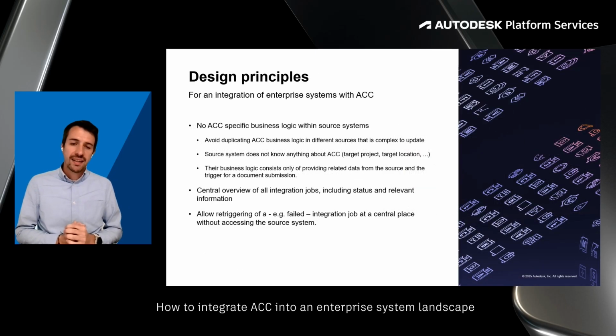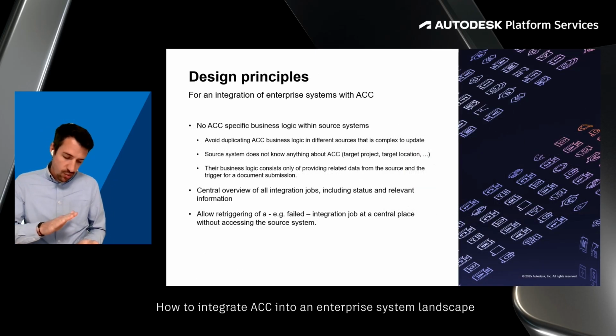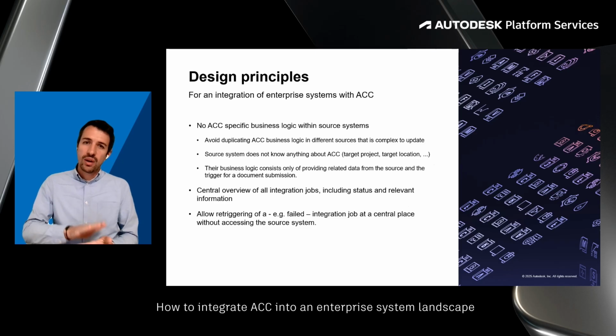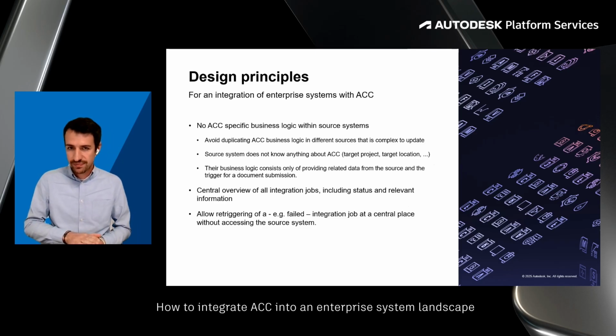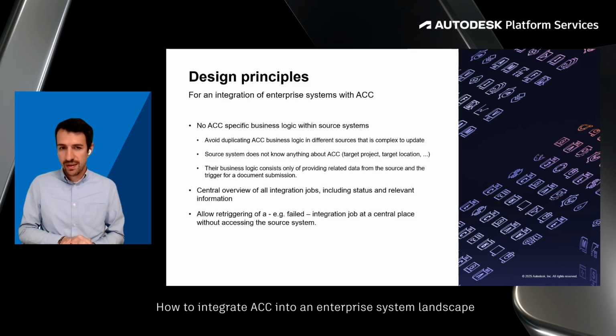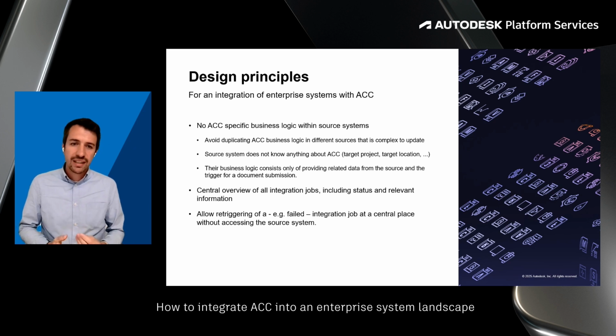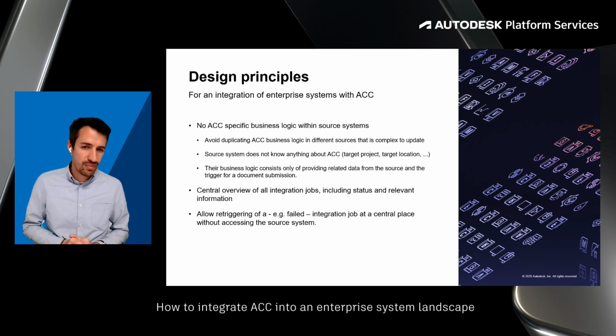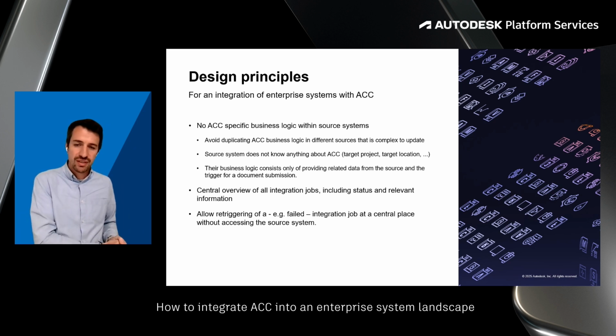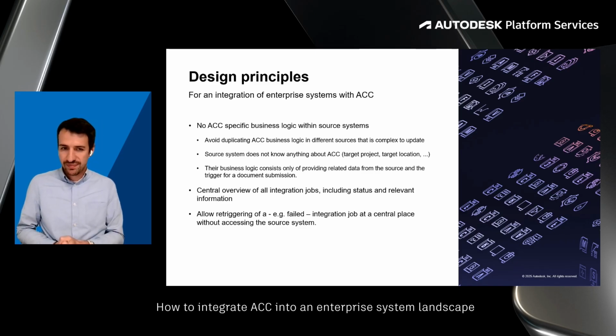But before we started with the implementation, we thought about, okay, what are our main design principles for such an integration? And the first one is no ACC specific business logic within the source system. Really avoid duplicating business logic in the different sources that is complex to update.